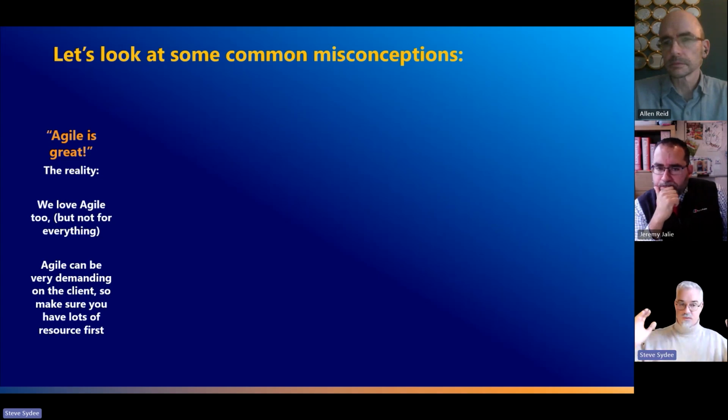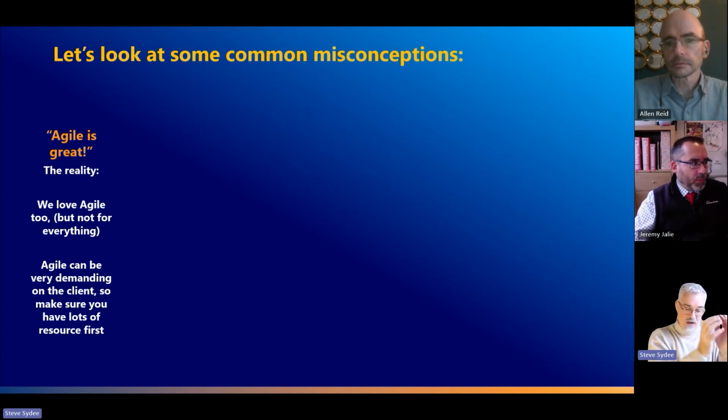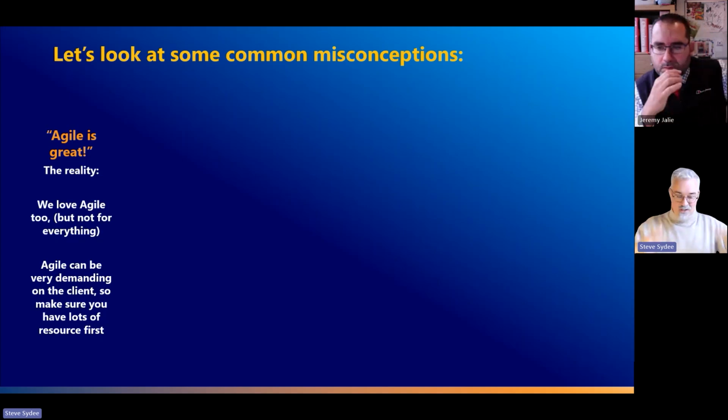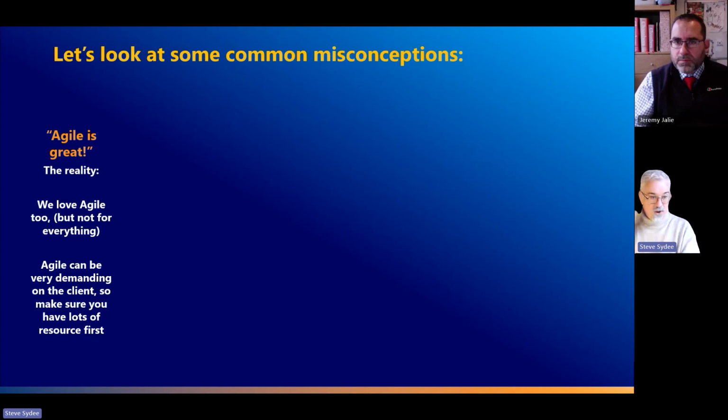If you don't look across the width of your requirements in functionality to begin with, like in discovery, you can quite often in agile go down a bit of a rabbit hole. So we've had situations where we've been asked to follow the customer's agile method, and you go down and develop a lot of membership stuff only to have to undo some of it because it doesn't work when you move to events. So look across the project and then iterate down on the different areas of membership, events, and so on afterwards.